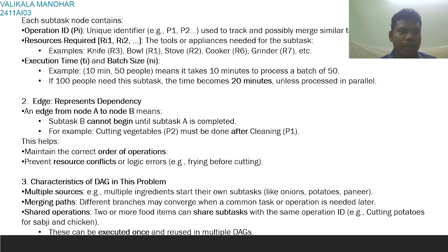Edge, which represents dependency. An edge from node A to B means subtask B cannot begin until subtask A is completed. For example, cutting vegetables, P2, must be done after cleaning, P1. This helps maintain the correct order of operations and prevent resource conflicts or logical errors.